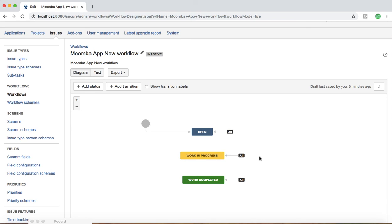Those are the four key components of a workflow. To summarize: Open, Work In Progress, and Work Completed are the statuses signifying where your issue is; the arrows showing transitions between statuses are the transitions; the Assignee is the person the issue is assigned to; and Resolution explains why an issue moved from one status to another. In the next tutorial we will dig deeper and understand different details and design a workflow in more detail. Thank you for watching.